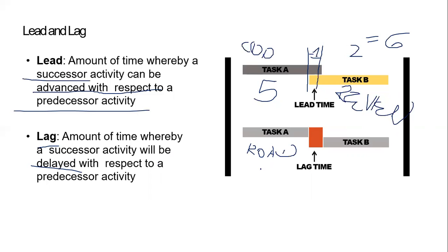So if I'm constructing a road, let's say it takes 7 days, and I'm going to put the paint on it, which is nothing but the lines, like yellow, white lines, so that I know that construction will be finished. Now, once I put the concrete, I have to wait for 2 days to dry it up, and then my task is taking one day only. So if you see task A plus B, it's going to 8 days, but there is a lag. So the actual time will be added to the activity. So this is actually going to be 10 days, just because I have A plus B is 8. You cannot do that. So you have to consider leads and lags whenever in the project as well.